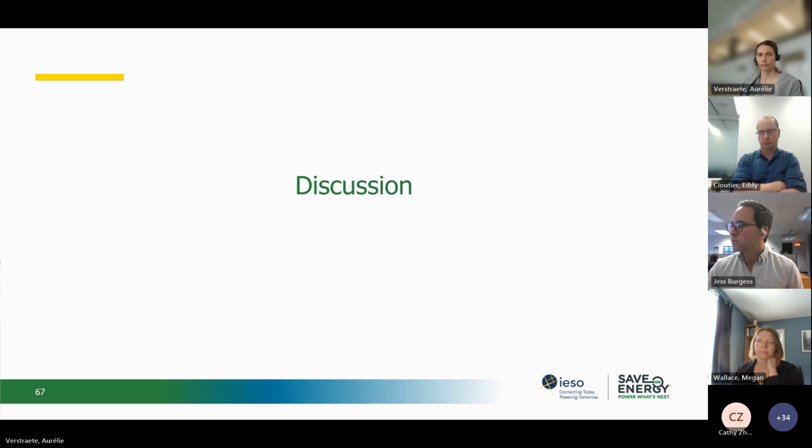I was a little bit remiss in responding to the cost question and didn't mention, so cost is variable and a challenging question to answer in general, but I should just say the EBCx program from Save on Energy does provide that incentive is 6 cents per square foot up to $50,000 for the investigation phase activities. And then there's additional incentives at 3 cents a kilowatt hour for energy savings achieved from the implementation activities. So there is incentive support there to offset some of those costs.